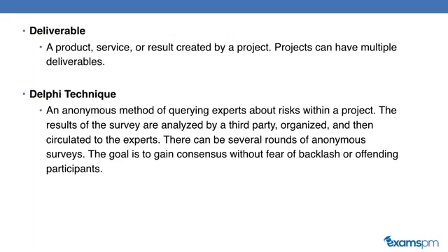The Delphi technique. This is when you will send out surveys to all of your stakeholders and they will respond back anonymously so no one knows what the other person is saying. And you might have to do several rounds of this in order to achieve consensus on an issue. The benefit of using the Delphi technique is that your stakeholders do not have to fear backlash or offending other participants. They can give you their real responses. The con of using this technique is that it could take a very long time.